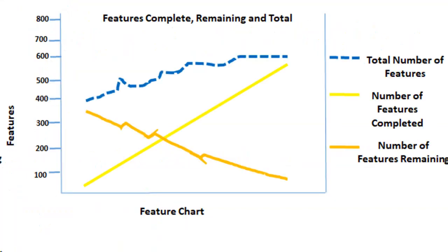Earned value in an Agile context. Each team has its own capacity. When a team uses story points, be aware that the number of story points a team can complete in a given time is unique to that team. When teams provide their own units of measure, teams are better able to assess and estimate and deliver their work. The downside of relative estimation is that there is no way to compare teams or add velocity across teams.